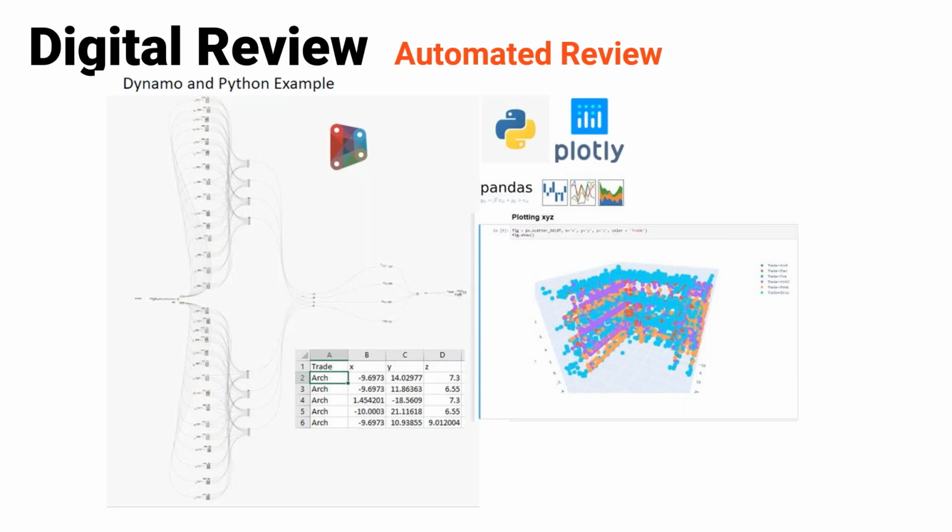But Dalton Goodwin and our team on this, they set up a series of tasks inside of Clarity to batch create the different Navisworks files. So it's exporting out the NWC, it's compiling them into an NWD that has a bunch of selection sets that are preset as a template based on like the E202 AIA contract document, so that we can go through and say that this is our standard level of clashes and all these things.